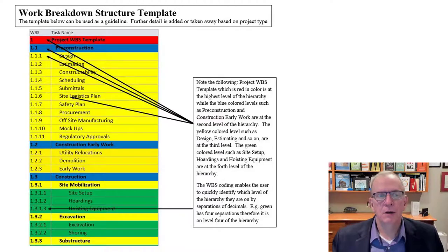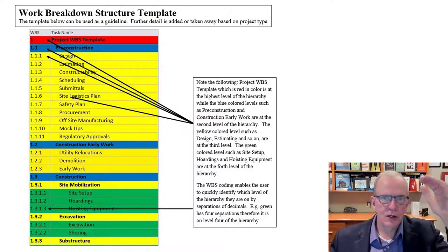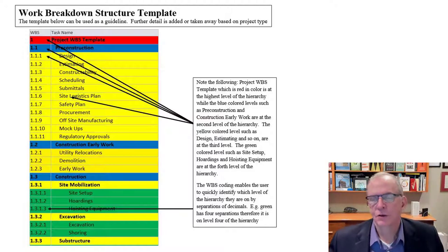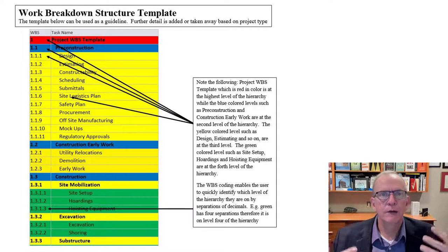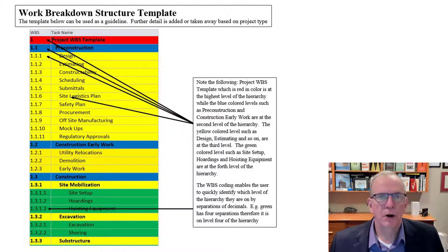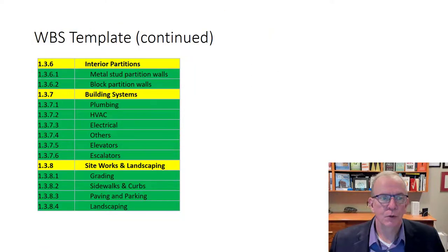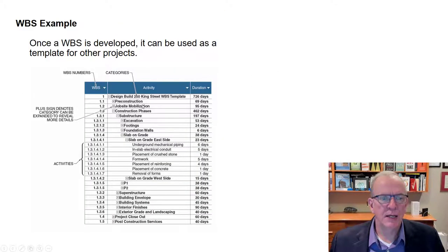So I'm talking about a condominium building or a hospital at a high level. You could be talking about a bathroom or a kitchen. You could have a template where you'd have standard headings, and then you could even have standard activities, because those don't change that drastically. And that could be your starting template, and then you could fill out all the unique information for a particular project, which would make it much, much quicker to do. And it would also act as a checklist, and the checklist ensures that you don't miss particular items of work that way. So kind of giving you that idea.